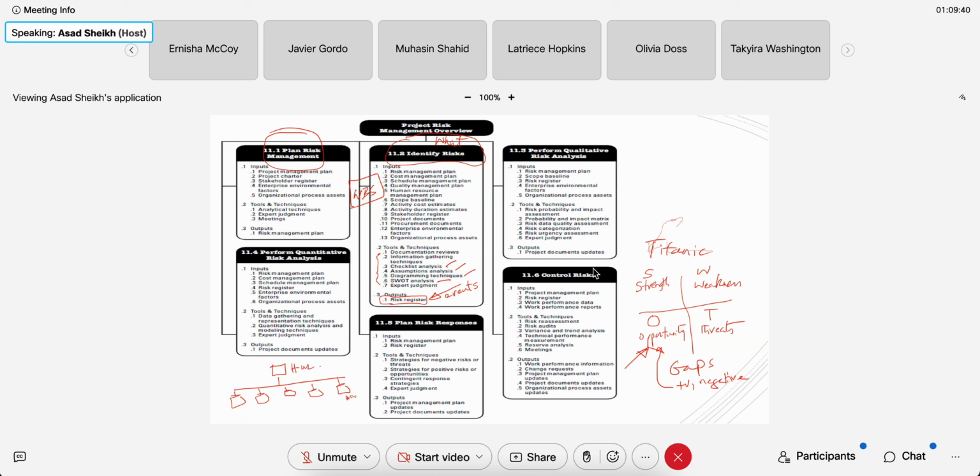So you can say, okay, I got this big house. That's too difficult to analyze. Let's break it down into these deliverables. These are my major deliverables. And then I'm going to break it down. And how do I break it down? I decompose. This word decompose is very important to keep in the back of your mind, that I got to decompose these deliverables into its tasks. And the very lowest level and up is your work package.